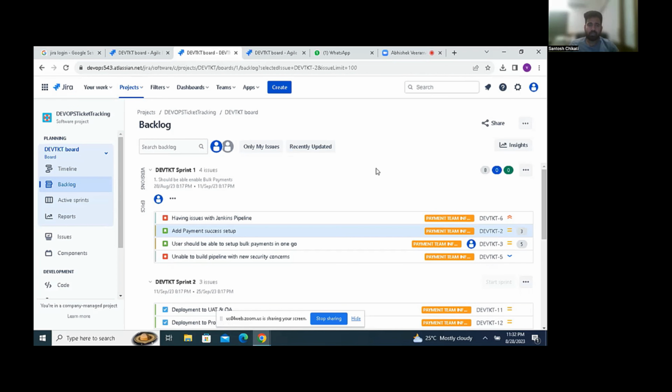In Scrum, one of the topics is the sprint. A sprint is time boxed, usually to 2 weeks. Some teams follow 2 weeks, some 3 weeks, some 4 weeks, depending on how comfortable they are, how mature they are with agile, and how many years they have been working. We usually do 3 weeks of sprint. So one sprint for us is a time box of 3 weeks, and we pick the user stories we can deliver in these 3 weeks.